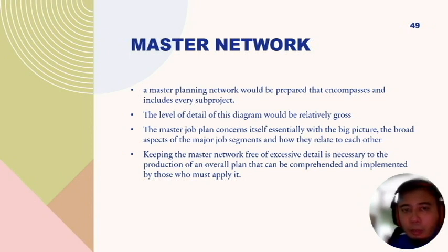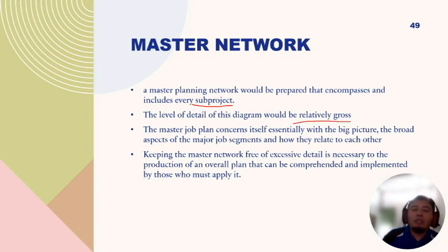Next, let's discuss the master network. A master planning network would be prepared that encompasses and includes every sub-project. The level of detail of this diagram will be relatively coarse, because you cannot put in so much detail in a master network, as the network will become too complicated and too big. So you cannot really utilize the network for your planning work.